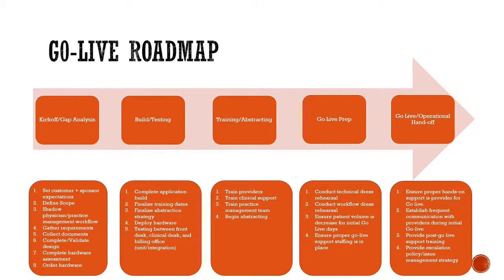In addition, you want to ensure that the patient volume has decreased for the initial GoLive date and maybe for the subsequent days, so that your staff and your providers have a little bit of wiggle room in terms of how they see the patient, because they know it'll take them a little bit of extra time initially. As they get more and more comfortable, this disruption will decrease and hopefully lead to more efficiencies.